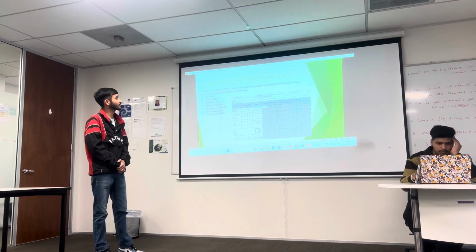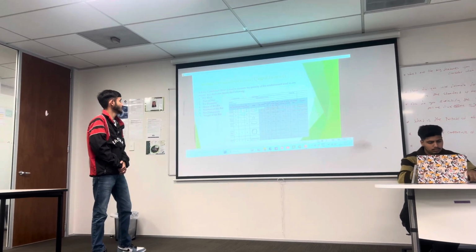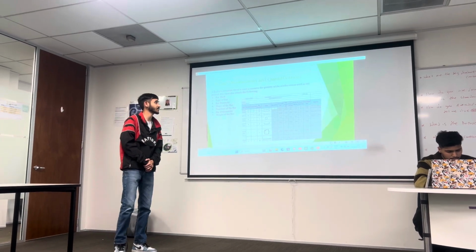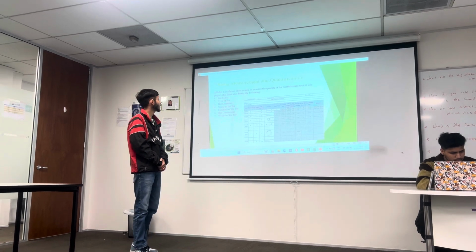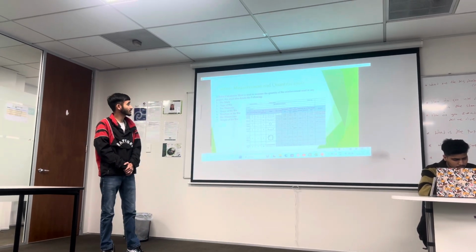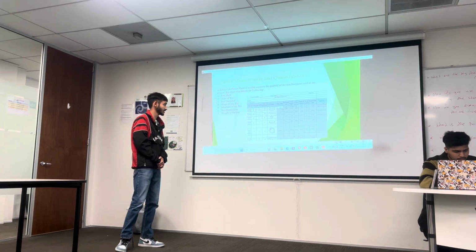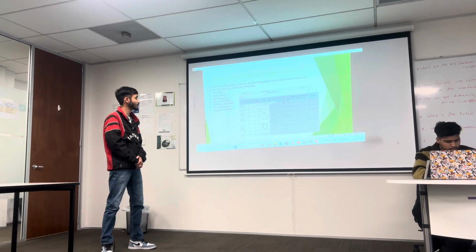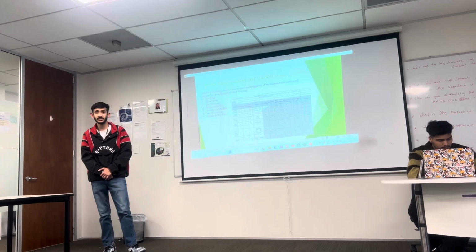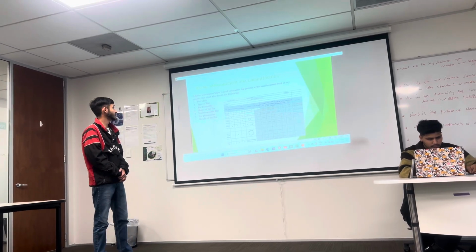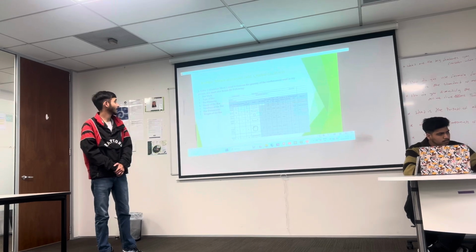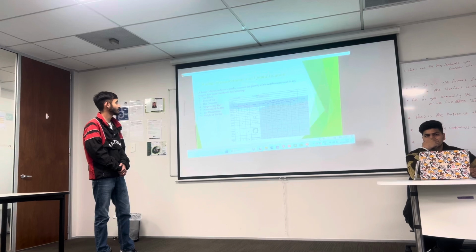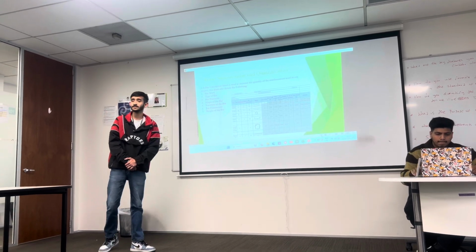Next, what is rebar measurement and quantification? A rebar calculation sheet is used to measure the quantities of the reinforcement used in any project. This sheet also details the following: the bar mark, such as T, M or any bar mark, then the type of bar, whether U shape, L shape or plain ones, then bar diameter, different diameters of the bar, shape of the bar, number of bars used and the bar dimensions along with the weight of the bar.